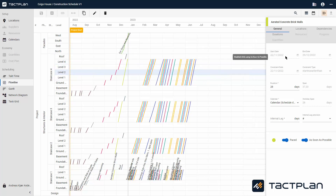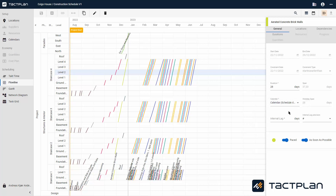For each task, you can see the start and end date. The duration shows the total duration of the task for all locations. You can also see the total timespan in calendar days and working days. Calendar refers to which calendar the task should follow. The 'paste in as soon as possible' settings are very unique for location-based scheduling and will be covered in another training video.